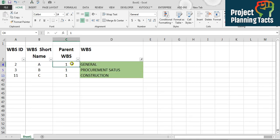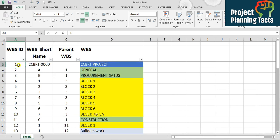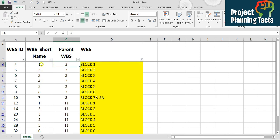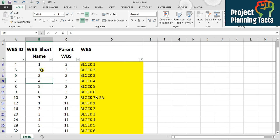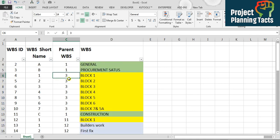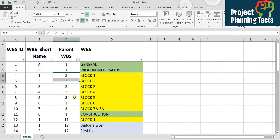If I filter by green color you can see A, B, C — and here I have the parent WBS ID. The parent WBS ID is 1, 1, 1, which is referring to WBS ID 1. For WBS level 2 in yellow, the short names are 1, 2, 3, 4, 5, 6, 7 and these seven are all referring to parent WBS number 3. Number 3 basically refers to the procurement status WBS ID.